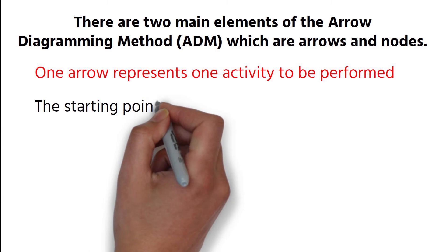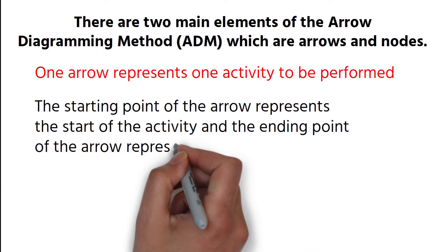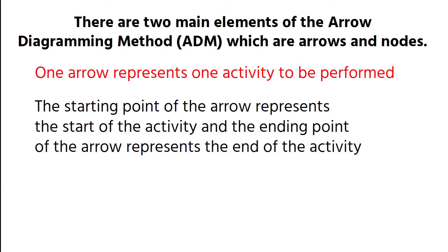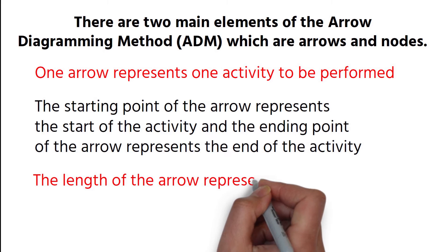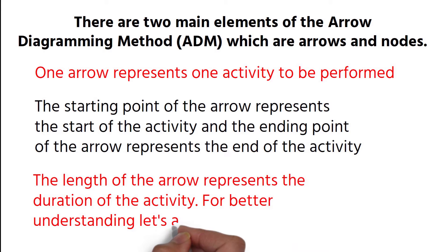The starting point of the arrow represents the start of the activity and the ending point of the arrow represents the end of the activity. The length of the arrow represents the duration of the activity. For better understanding, let's analyze the schema.